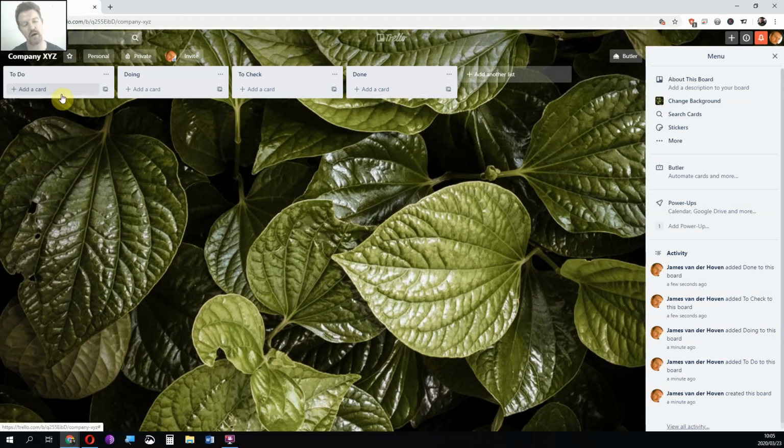So now in Agile Project Management, you would have a day set where you can do all of your planning. Now that planning really depends on how big the project is. In Agile Project Management, the given bulk of work is normally called a sprint. I'm not going to get into that too much, but it normally is about 2 weeks that you do planning for. That can be 2 weeks to months, and it really depends on how you break those chunks of work up into what are called sprints, and each batch of work that is done is the completion of the sprint. So we do weekly sprints because we don't do massive projects.